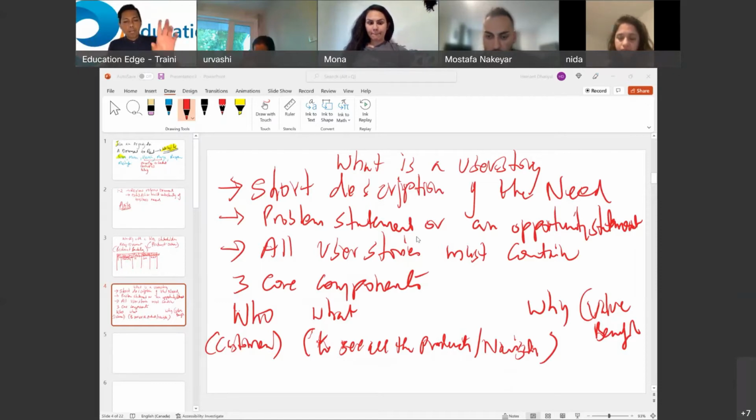Yeah. And a product backlog will contain a user story ID, user story description, priority of the user story, some level of high level estimate of the user story, and some other comments that maybe provide greater level of details around the user story. Does that make sense? Yes.